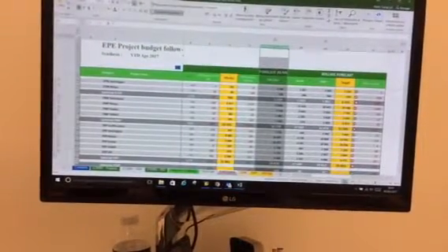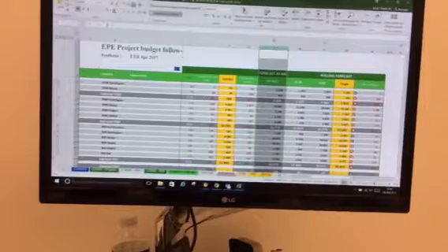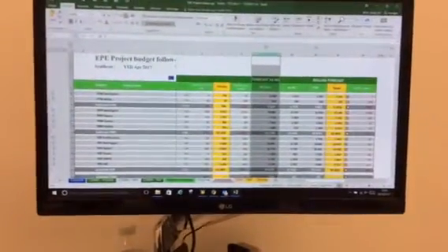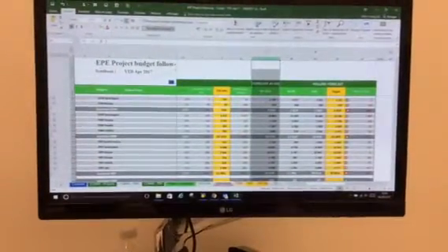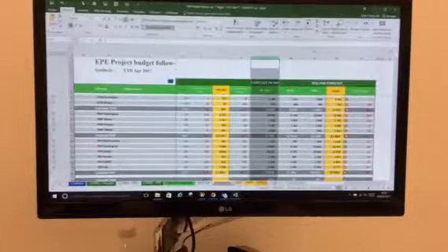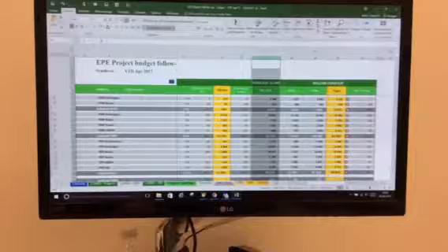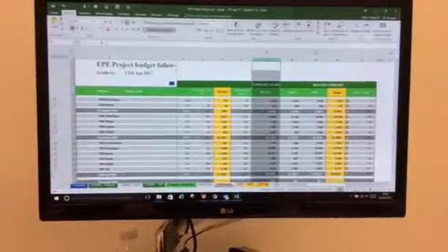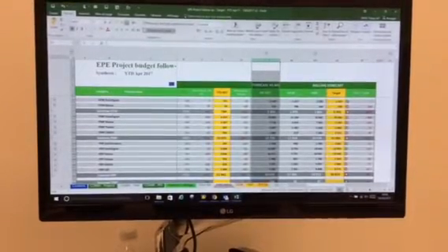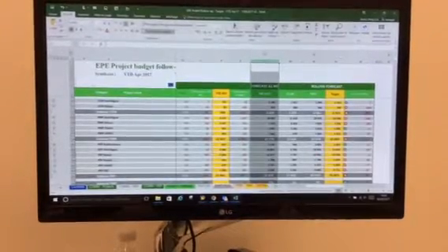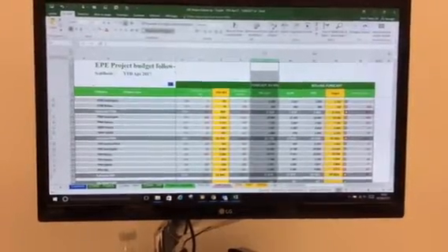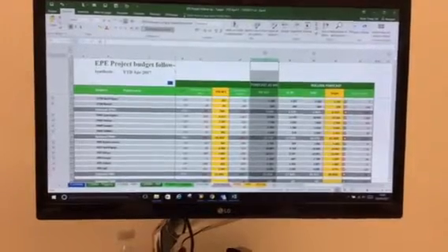So does that impact the forecast as well? Yes. For example, we see that if one project is happening in France, we know that from the first part of the year, January to April, normally they use more resources. They spend more compared to the period between May and August, because for the French resources, they have quite a lot of holidays. So it will impact your spending.